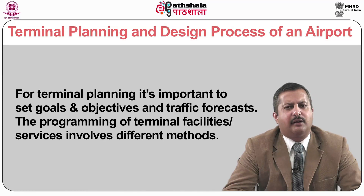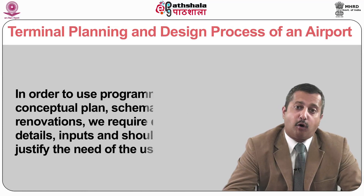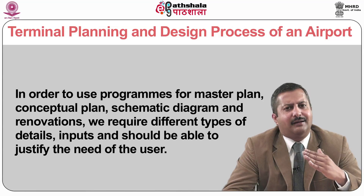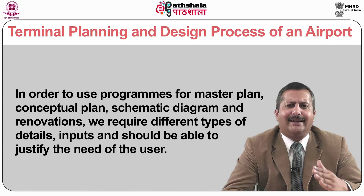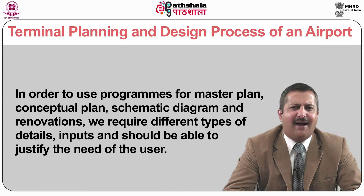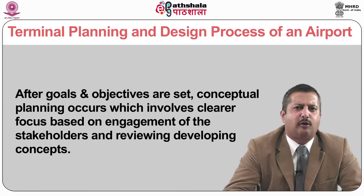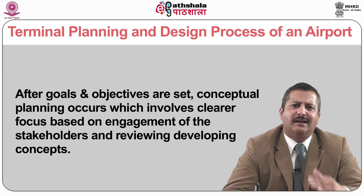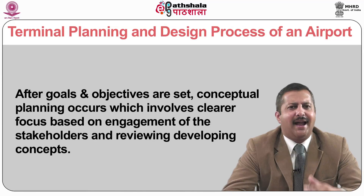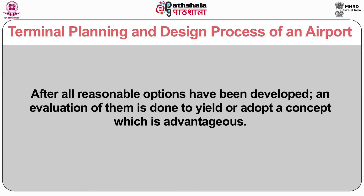For terminal planning, it is important to set goals and objectives and traffic forecasts. The programming of terminal facilities or services involves different methods. In order to use programs for master plan, conceptual plan, schematic diagram and renovations, we require different types of details, inputs and should be able to justify the need of the user. After the goals and objectives are set, conceptual planning occurs which involves clearer focus based on the engagement of stakeholders and reviewing and developing concepts. After all reasonable options have been developed, an evaluation is done to yield a concept which is specifically advantageous.